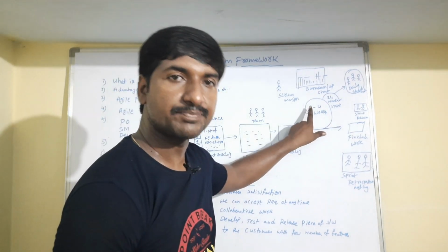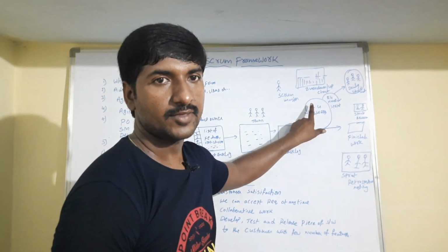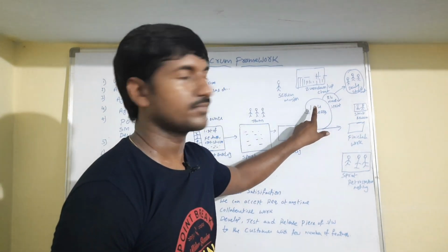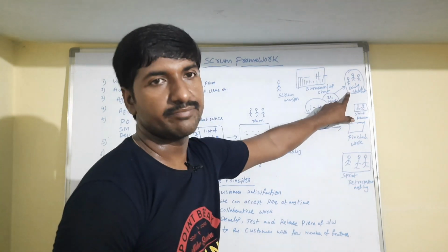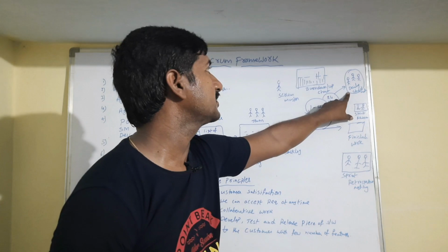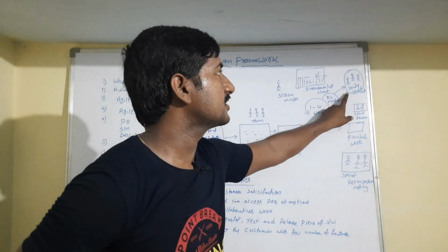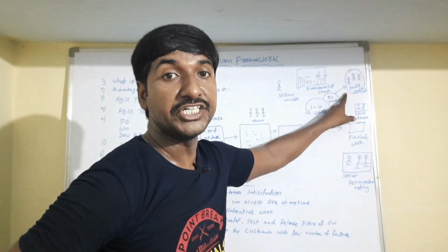So usually the sprint duration is 1 to 4 weeks. Okay, maximum companies will follow 2 to 3 weeks, guys. And for every 24 hours, one daily stand-up meeting is there. Who will conduct this daily stand-up meeting? The Scrum Master.